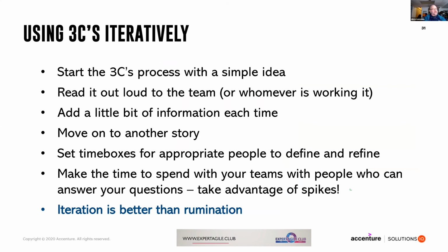There's an impression that some people have, I think it's a misunderstanding, that entire teams must partake in all story elaboration always. That's not how I coach. I coach that it's the product owner's responsibility, or amongst their responsibilities, to find out who the right people are to talk about each story. And that we don't need to have agreement from the whole team in order to move a story forward. That turns into a very wasteful practice, and it can be taken to ridiculous extreme. But when we say the team, we mean the little t team, whoever's working on the story.